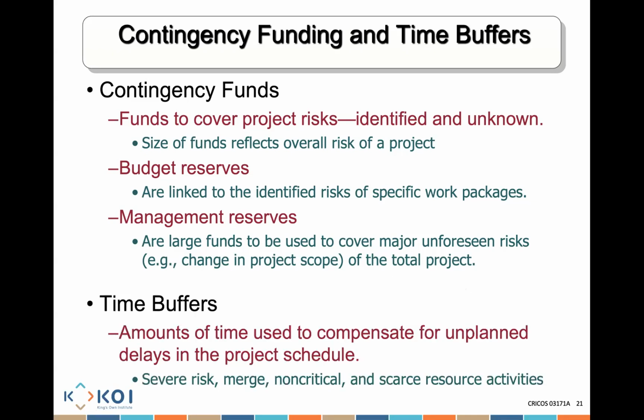Time buffers are also something we need to bear in mind, because sometimes, if a risk does become a reality, things will start taking more time to be completed. So what do we do with them? Well, we need to have some time available, an amount of time used to compensate for unplanned delays in the project schedule. How do we manage something like that particular issue?